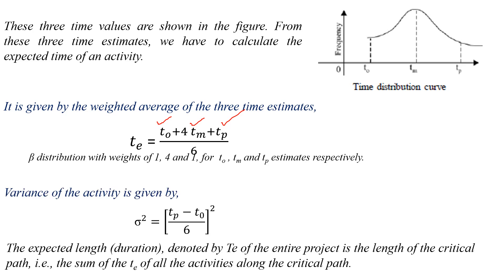The variance of the activity is sigma squared = ((Tp − T0) / 6)². The expected length of the project, denoted by Te, is the length of the critical path — that is, the summation of Te for all activities along the critical path: Te = Te1 + Te2 + ... and so on.